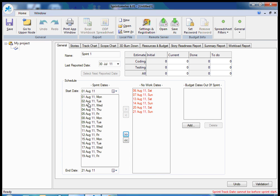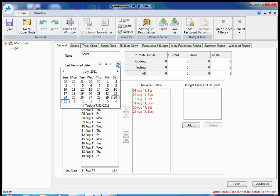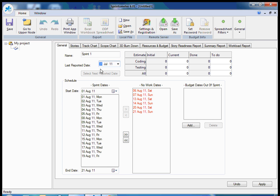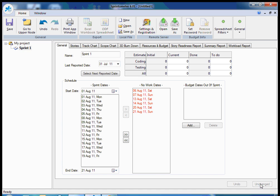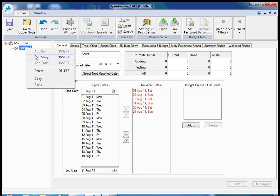Now the schedule of the sprint is defined and I should select last reported date to the first day before my sprint. This parameter is very important because it defines which column is the last one for time tracking. The application should know what's the current date for time reporting.